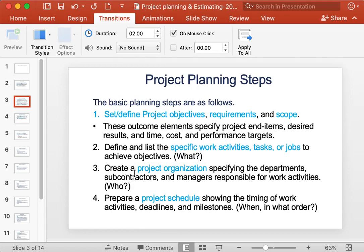The next step is to create a project organization by specifying the departments, subcontractors, and managers responsible for work activities. By doing this we get answers to questions like who will do what for the completion of the project.